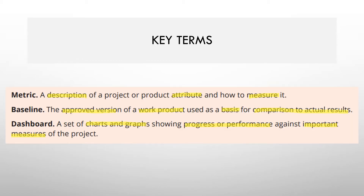All four desired outcomes are very important. Now let's look at the key terms for this domain. First is the metric — a description of a project or product attribute and how to measure it. For example, defect containment measures internal versus customer defects to understand leakage. The second term is baseline — the approved version of a work product such as schedule or budget, used as a basis for comparing actuals. The third key term is dashboard — a set of charts and graphs showing progress and performance.